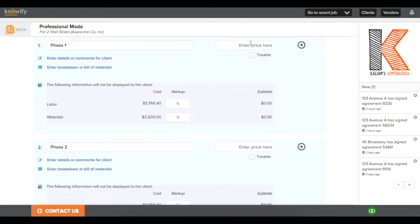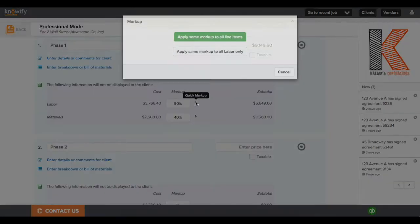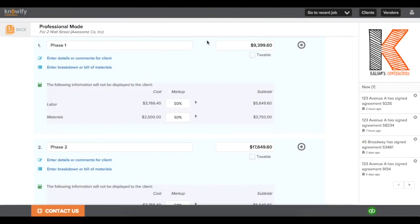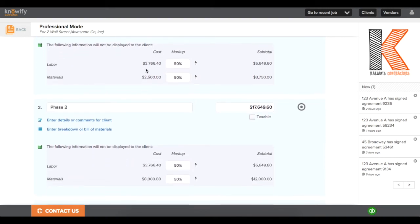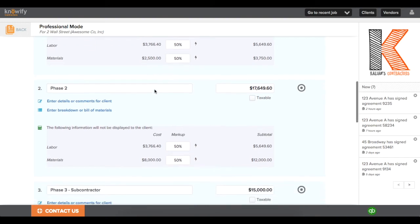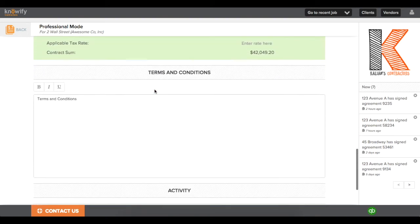So when I'm quoting my prices, I have the option to view my estimated cost right in a markup percentage, and my price is going to be automatically quoted using my estimated cost plus the markup that I applied. This way, if you can stick to the estimated cost that you set up in your project plan, you're more likely to see a better profit on this job.